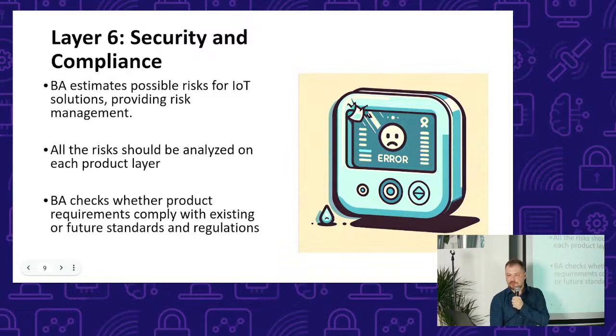And also future products could have different other risks, not only concerning, for example, access to the data, but other business risks. And it's a good practice to have a risk register where all of these risks are estimated, have a scale, for example, from 1 to 5, and where we can figure out what we should do to mitigate or remove this risk.